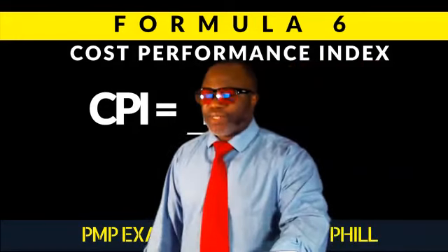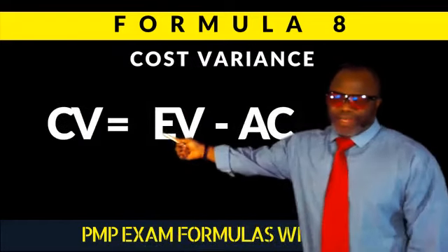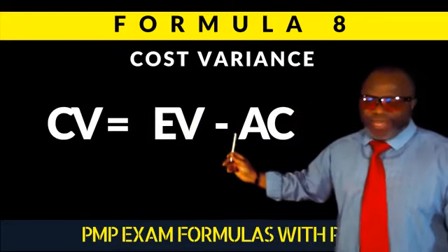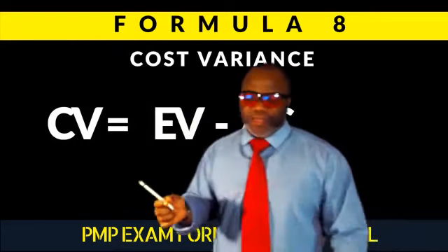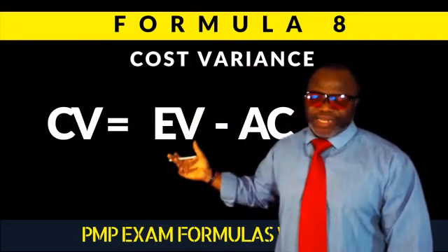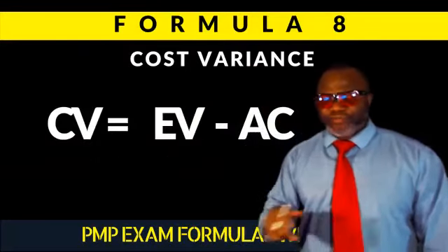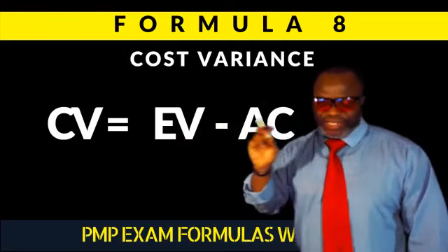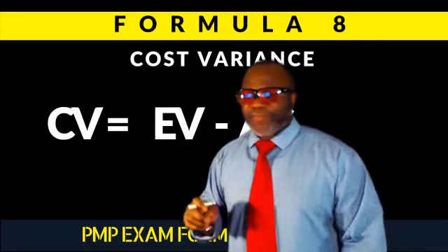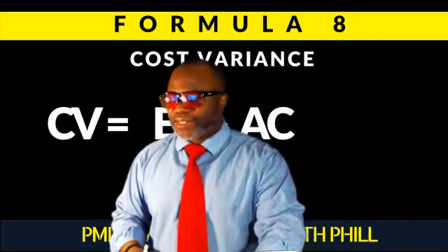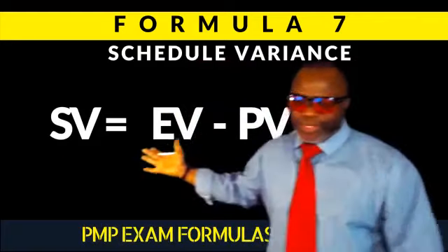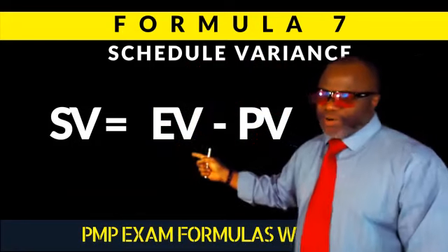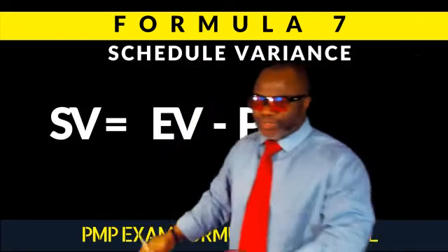Now let's take a look at the cost variance. Cost variance, again, children eat a lot. If you've got a minus, it means you could have a negative number. So if you've got a negative cost variance, that's bad. Anything with a minus is bad for both cost and schedule. If it's greater than 0, it's good. If it's equal to 0, right on target, okay? And that's the idea. Same thing, equal to 0, perfect. Less than 0, undesirable. Greater than 0 shows that it's good.